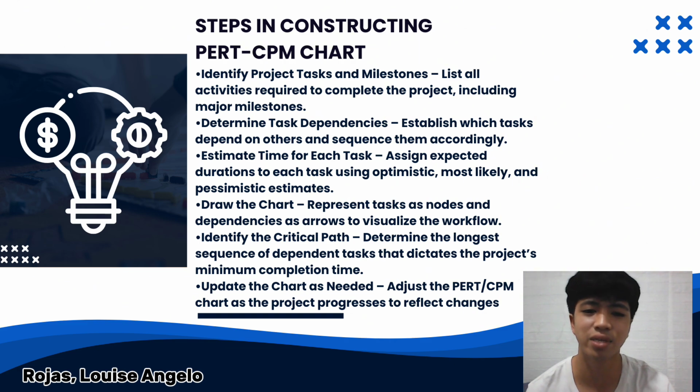scheduling and timely completion. And lastly, update and monitor progress. Projects may face changes or delays, requiring updates to the chart. For example, if equipment procurement is delayed, adjustments are made in later activities. This ensures flexibility and keeps the project on track. So that's all.